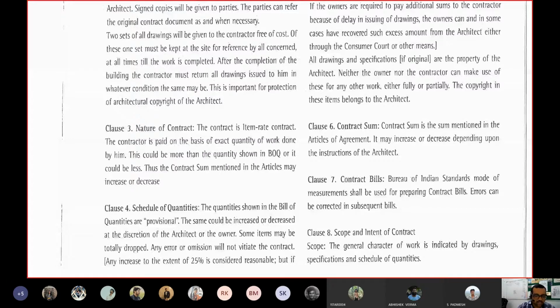It was not that legal. In the tender, there was this BOQ, bill of quantity, mentioned. But right now, what I feel is, in this contract I will not make the windows as I promised. I will sign a different contract for the material for the windows, and just keep the window opening and the door opening empty. So you can drop some of the BOQs while signing this contract. In this particular section, the schedule of quantities, that quantity and its schedule of arrival or procurement has to be mentioned.